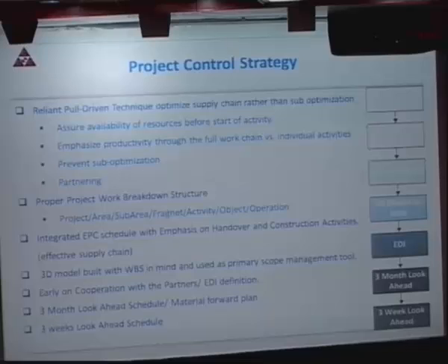And then BIM needs to be able to bring you information about the drawings and any constraints, availability of crews, and so on. So this is the setup we have done for our project control, and we believe with this setup we can do it. And at C3D, in the middle, links to everything. We need a standardized methodology. We have a lean-based, reliable, pull-driven technique that assures availability of resources before the start of an activity.